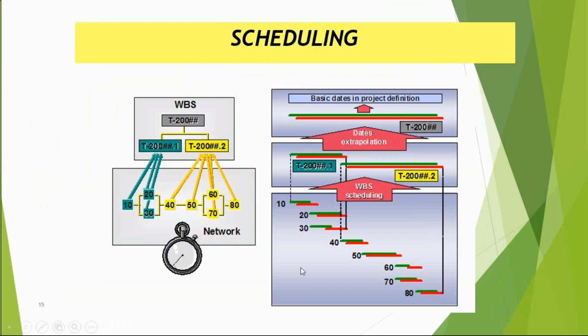How they are interdependent: if my first activity gets delayed, the next activity, which is supposed to start from it, is affected. Everything is finish to start or start to finish, and there's a time lag also. They have given everything, the relationship has been established here. Accordingly, it will start. Even if you see there is a time lag, once it finishes, the next activity starts a bit delayed. Got it. We are going to establish these relationships in my activity steps, and accordingly the same relationships will get populated.